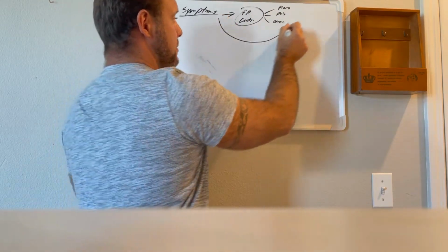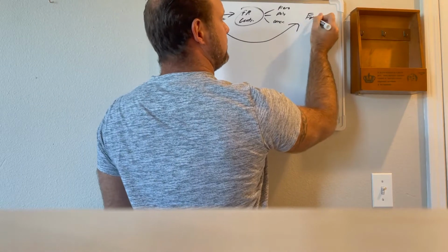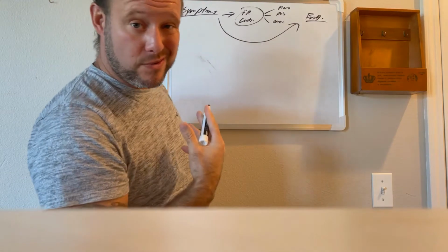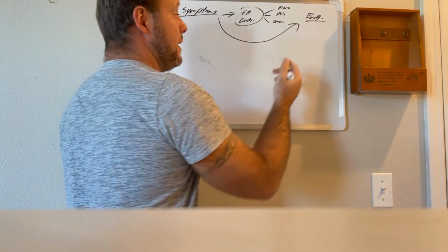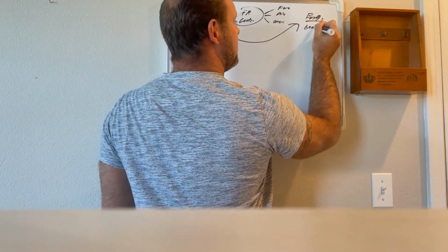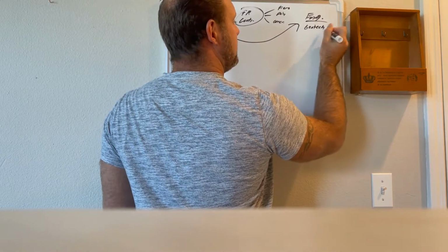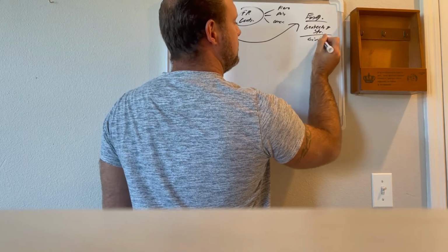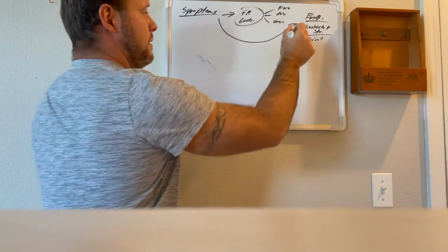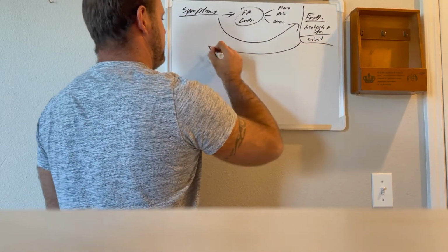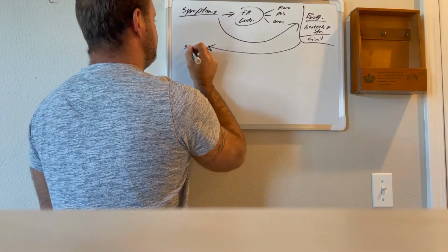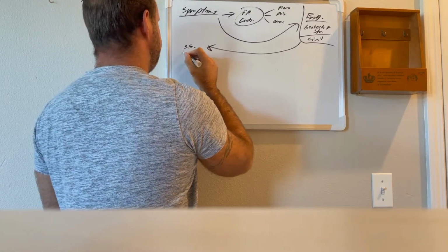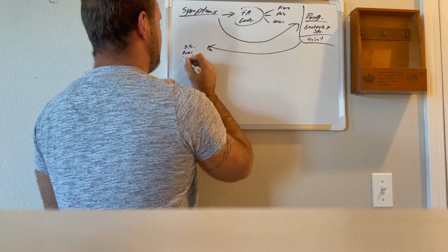What you can go right to is selecting an engineer. You can pick one of these guys' recommendations. I don't recommend that, but you can do that. You can get a geotech and structural or a civil involved. These guys will do some soil sampling. They're going to do an evaluation of the property, and they're going to provide recommendations.